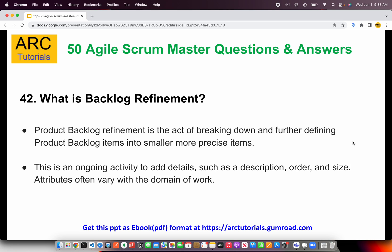What is backlog refinement? Product backlog refinement is the act of breaking down and further defining product backlog items into smaller, precise items. This is an ongoing activity to add details such as description, order, and size — attributes that often vary with the domain of work. You take the stories, add more details, screenshots, and acceptance criteria. Basically, refinement is when you work on the stories — if some are too big, you break them down into smaller stories, adding details like the environment, URLs, credentials, whatever is required to get the stories done.